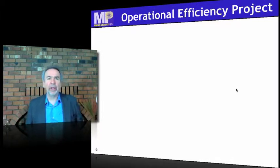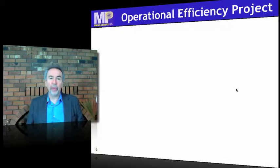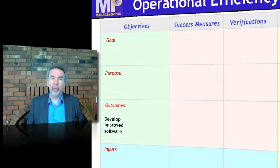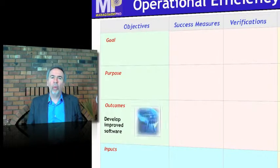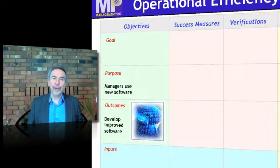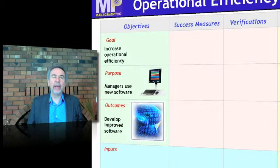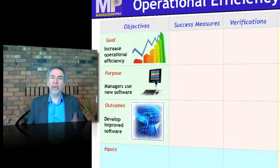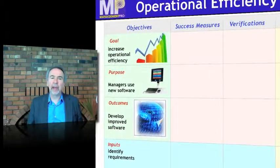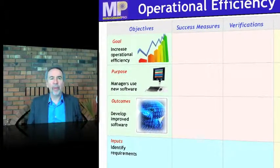Here's a client example. I had a client developing some improved software. I asked him, what are you trying to accomplish and why? He said he was trying to develop improved software — that's his outcome. The why is where you really become strategic. Why are you doing it? So managers will use the new software. And why do you want managers to use the new software? So we can increase operational efficiency. So with that hierarchy of objectives, we can define some of the tasks — identify requirements and so forth.